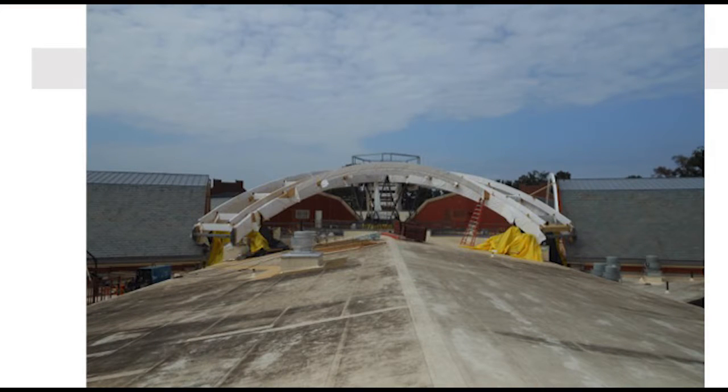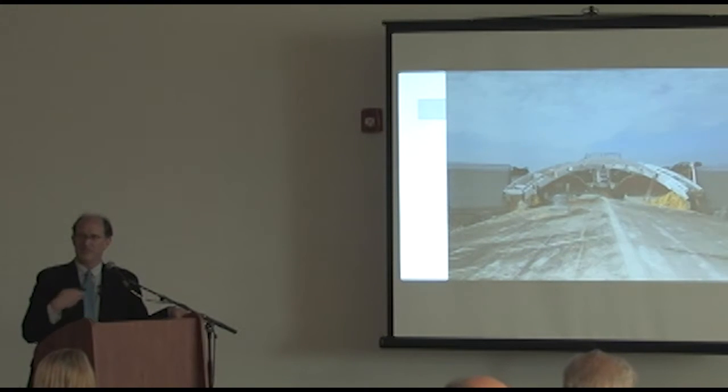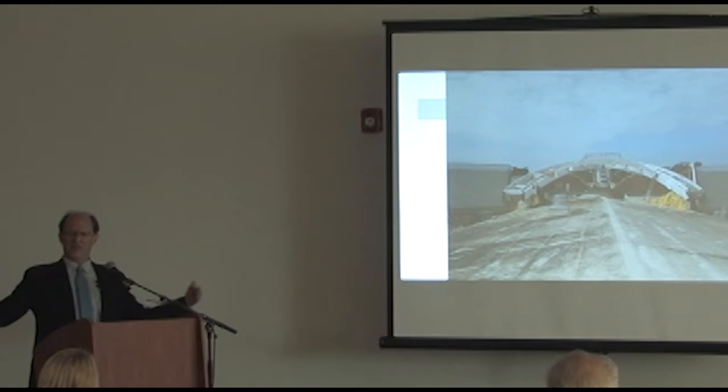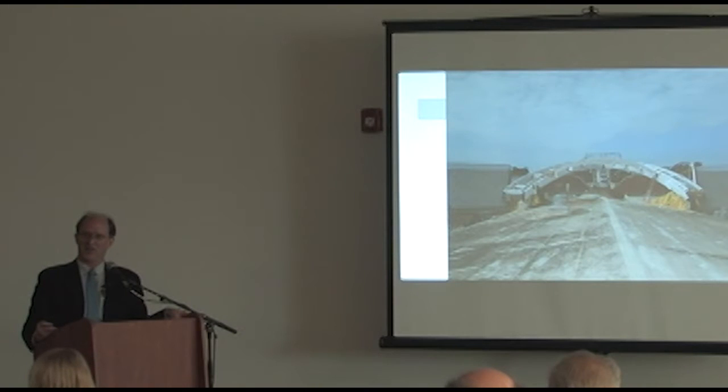everybody's looking at it. It was planned to death. I mean, those concrete beams were measured 200 times before the first thing flew up there. Everybody would know everything was going to fit. And in fact, everything fit except for the last arch on the farthest side. The arch was a little bit wider than the gap that we needed to put it in. All I did is put a come-along on it and squeeze it. But I think the arch had relaxed a little bit since it had been fabricated.